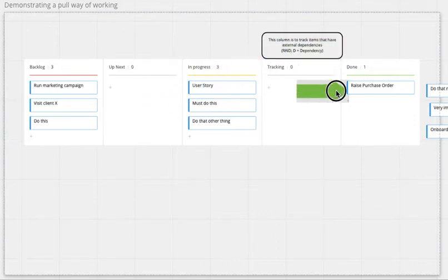Next day, come down, celebrate your success, come over here, form a new 24-hour plan for that, 24-hour plan for that, 24-hour plan for that, and can you pull any more in, yes or no? So this is capacity-driven planning, where the team members pull tasks to themselves. They know where they can contribute because they are the experts, not us.